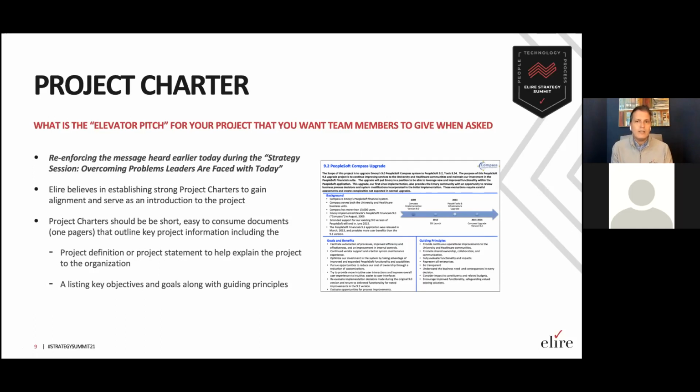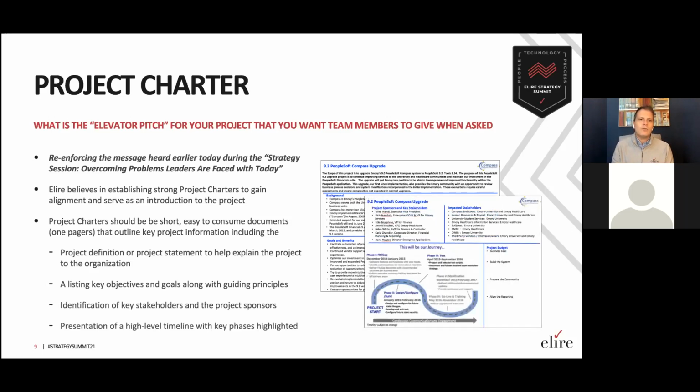And I see Q&As are starting to come in, and we will definitely field those as we get going. Katie will take note of those. And then down here, we have goals and guiding principles. And again, the key here is to make sure that everyone is communicating the same message whenever asked what's going on with that project. Now, other things that could also be done are the identification of key stakeholders and the project sponsors, and also a high-level timeline with the key phases highlighted, and maybe the definition of the phases.